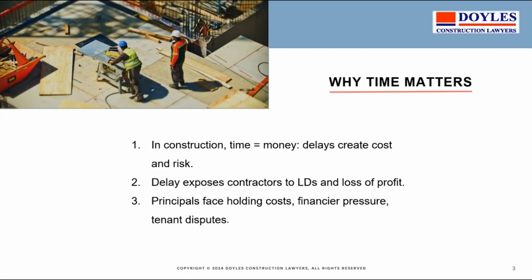The situation of delivering a project a year late is reasonably mission critical to a contractor who otherwise will have to deal with the liquidated damages, but also a loss of profit from his own side, where the extension of the construction period extends his delay and his overheads past the budget that he tendered on.